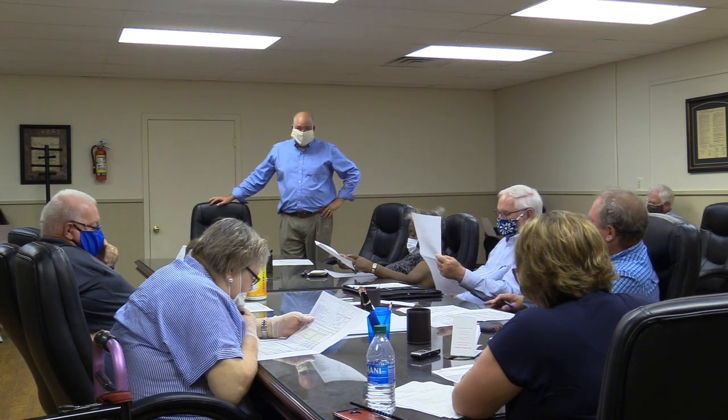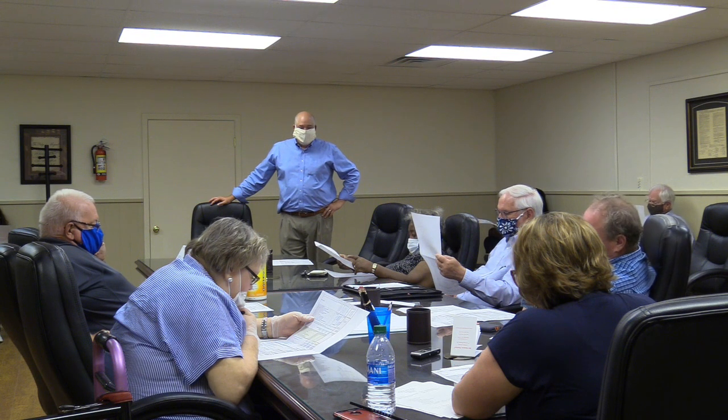So basically the bottom line is, as we stand right now, there's a $350,000 contingency in the project that's unaccounted, that's just not earmarked. It's a contingency. That is outside the allowances, outside of all these other line items. After that contingency, after the cost obligation, after the re-roof, after everything that we know, we're basically around $43,000 remaining in the bond issue. So we made our best effort at accounting for everything we know we can account for. We've made a serious effort to track the money and be as responsible as we can be.